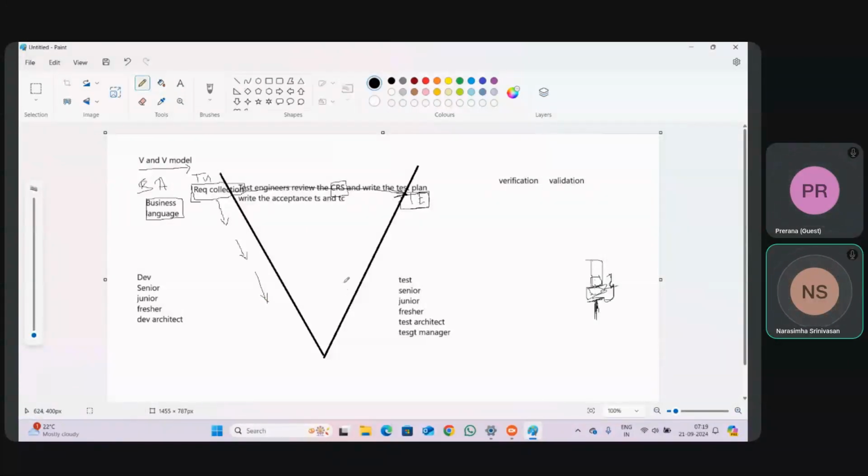They got to know that some mistake is going on. Later they will tell the developer, see, this is a mistake or defect. The developer will say, as per my design, I have written the code. He will escalate to the design team, and the design team again escalates to the requirement team. It means again we are going back. We are doing something called reworking. Reworking will take more time again. Got it?